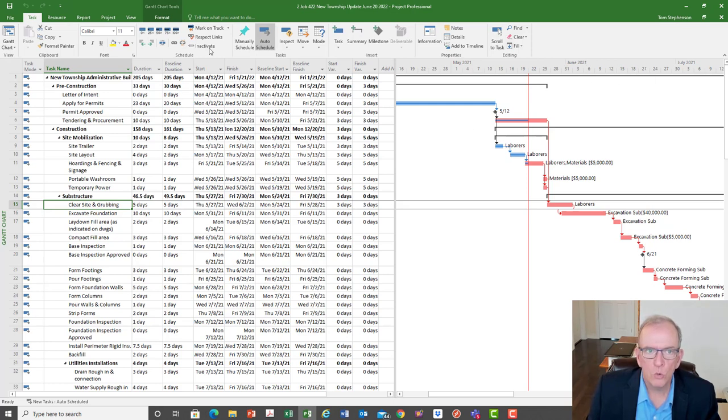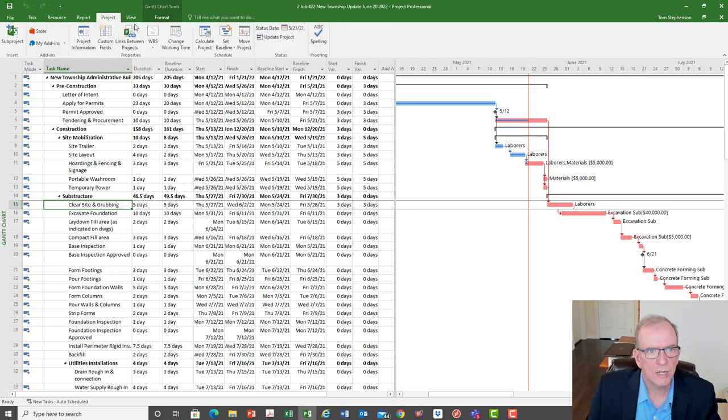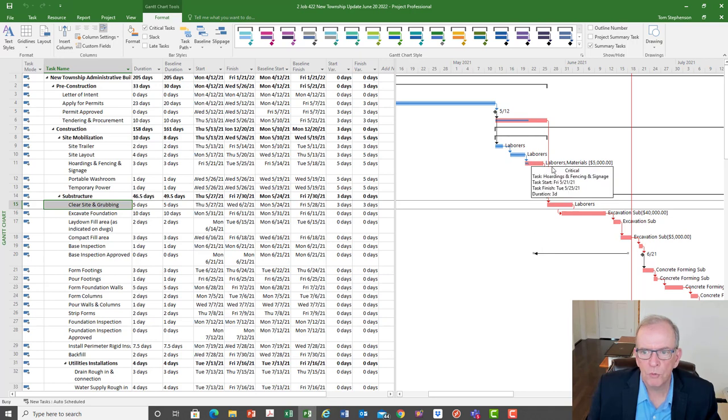And so then you would change your status date, and your status date would be under project. You would go to status date, May 21st, and now you would go to June 20th. Of course I picked a Sunday. Okay, let's make it the 18th. Okay, and we click the 18th, and now the next status date is here. So now we would be updating in this update period from here back to our previous status date, right? So this is going to be updating from this point up to this point. And then we would check it.